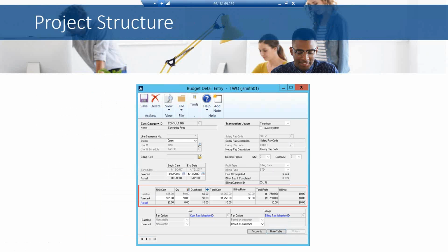We also have the ability to enter purchase orders and associate those with a job so that we can show committed cost, and then we can show actual cost as the goods and the invoices are received against the purchase order. And then obviously the payroll cost as well. So it's really important to see how that works. Plus, the last piece is the ability to attach inventory to a project, so if you maintain an inventory in your organization, you can pick items out of inventory which have been assigned a cost through your purchasing process and then assign those costs to the individual projects.